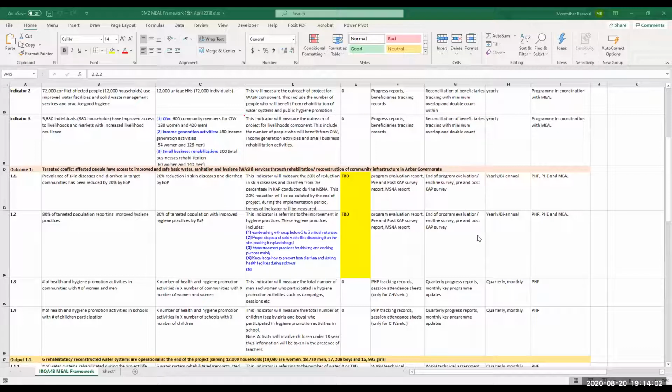If you have heard about it before, we call it a work breakdown structure, where you break down your work as a structure. So everything related to outcome number one will be 1.1, 1.2, 1.3. But if we have something related to 1.2, we should put it as 1.2.1. So that we call a work breakdown structure.